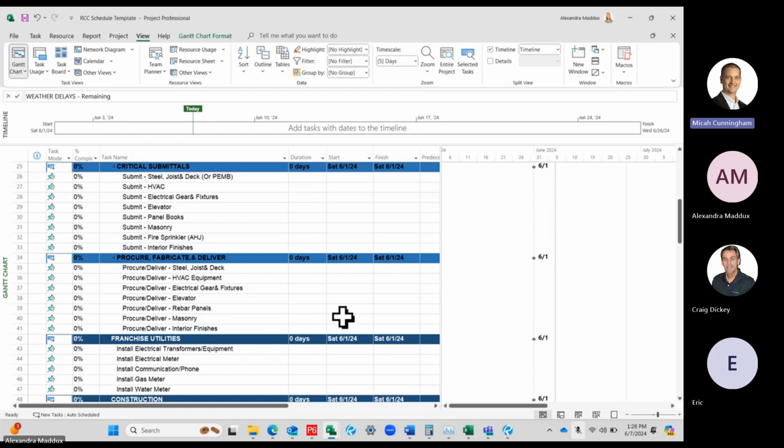So managing your float in your schedule. It's so important to do from the baseline to manage your float, because that's how you're going to calculate everything as far as how critical it is. It's also how you're going to set yourself up to be able to claim time for anything. So if your float isn't set up from the beginning, if you think that something has too high of float, then you're not going to be able to necessarily claim that delay later, because you'll have to manipulate your schedule to show that delay. So we'll get into that as well once we're actually building the schedule out.